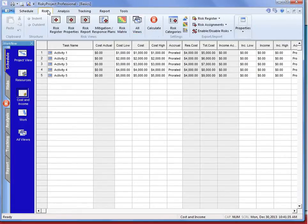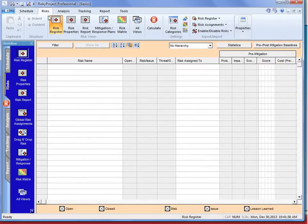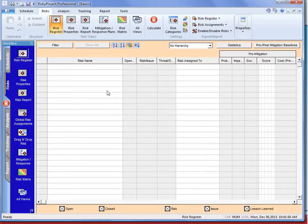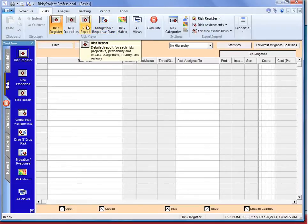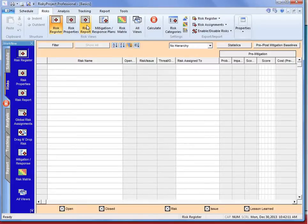The next stage of the workflow is the risks, and there's an integrated risk register. We can assign risks to the schedule, costs, or other risk categories that we're monitoring or managing. The risk register has properties and comes with a risk matrix that can be customized, including a mitigation and response plan and a built-in risk report where we can generate customized risk reports for every risk in the system.